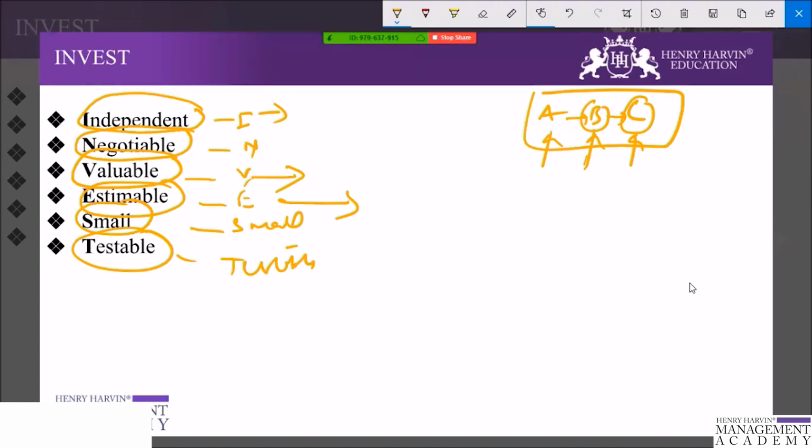Please time box the research, because if you are not time boxing the research, it becomes so lengthy that it will take more than a sprint just to research the thing, and they will name it a POC, because they don't understand what to do with it. If you do not time box the research part, it will take all the available time, thereby depriving the product of something else which could have been done instead. So estimation is the important part here.